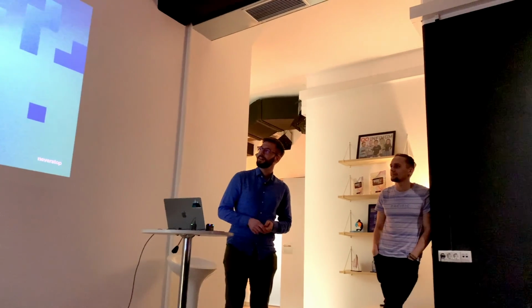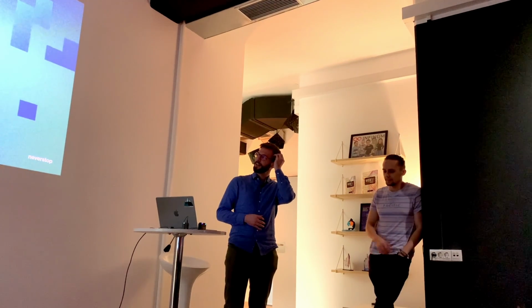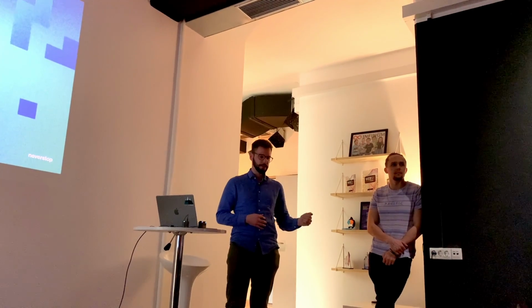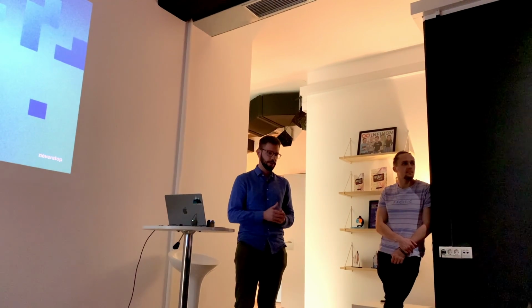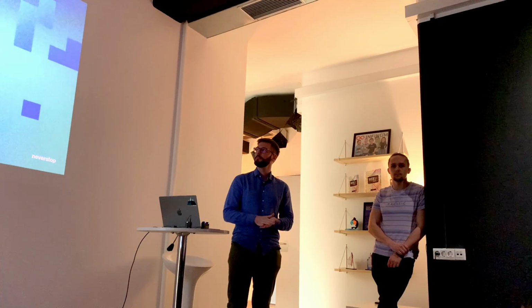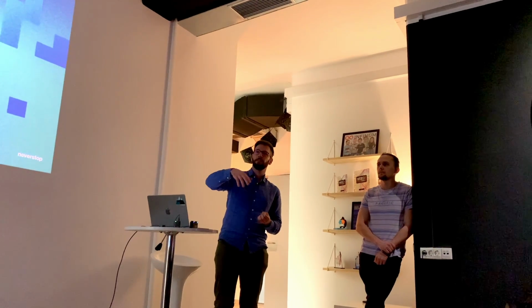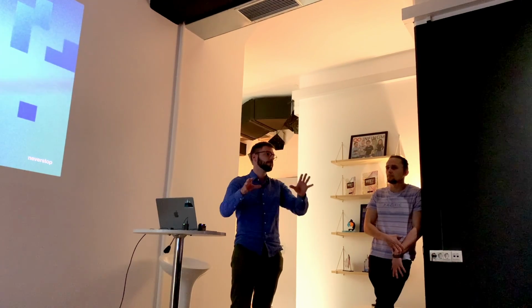We had a workshop at Infinum about this, and even after the workshop, I'm sad to say, I'm still not sure how to give good estimates. But a good guideline would be, if you have someone else who worked either on the same project or works on a part of the app that's kind of similar logically, I think it's good to sync with other people and get their opinions. So, for example, for an Android app, you could ask someone what's the minimum amount of hours you would estimate for a screen, like the simplest one, which could then give you some number to play with.